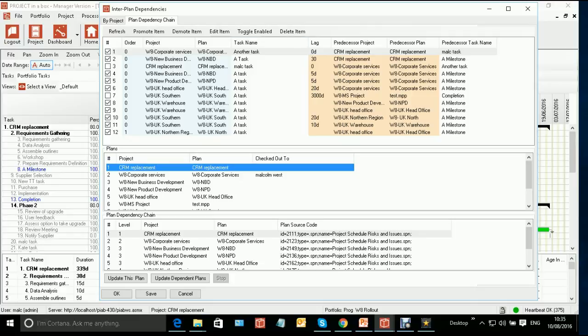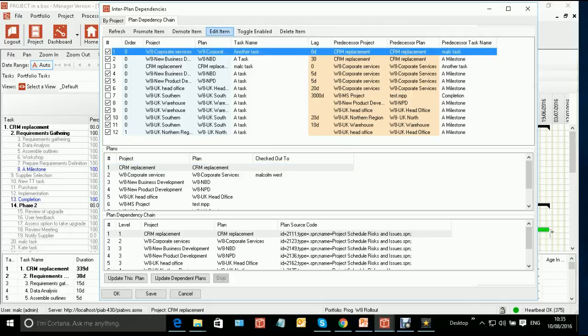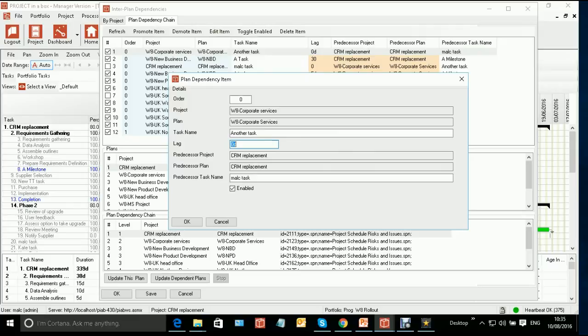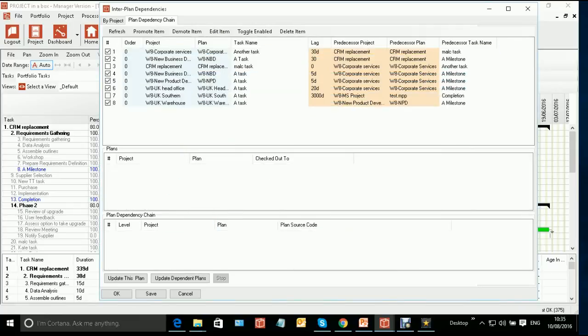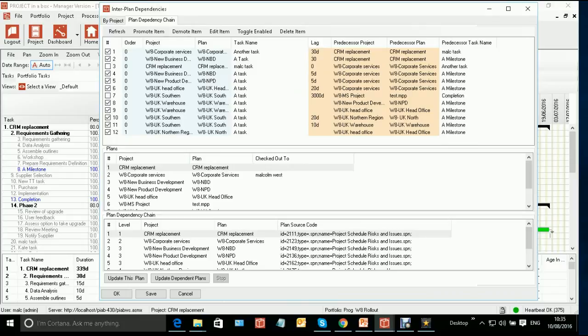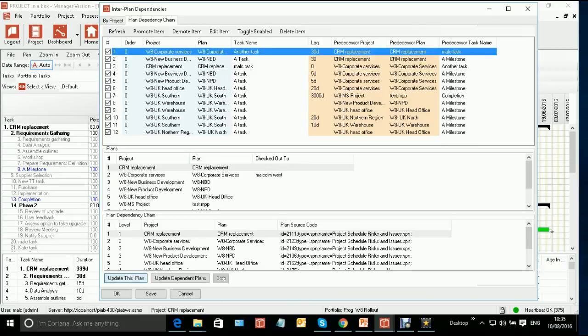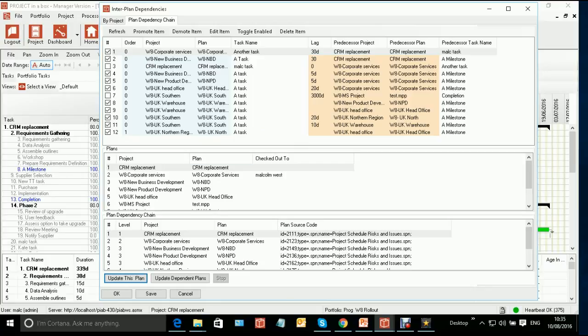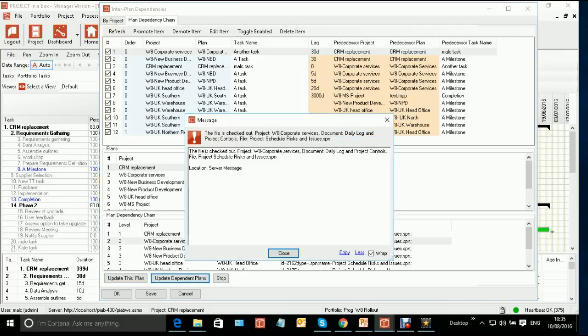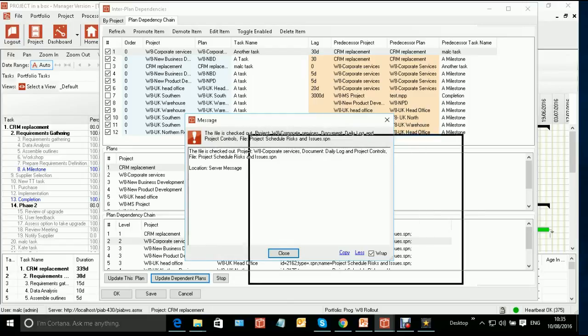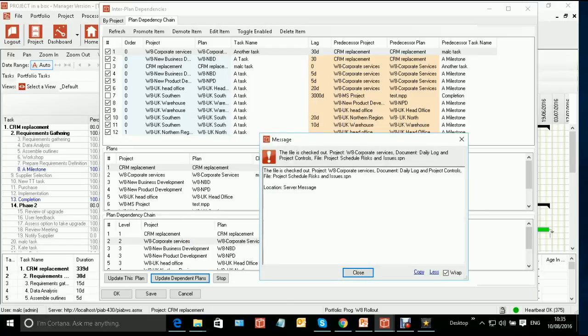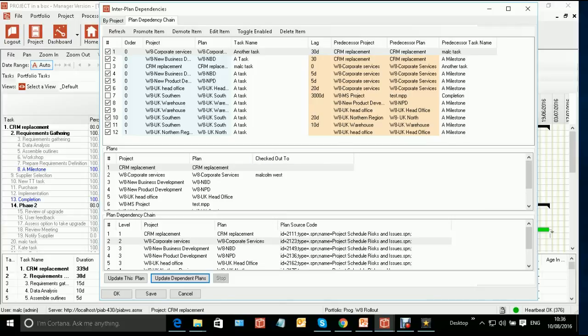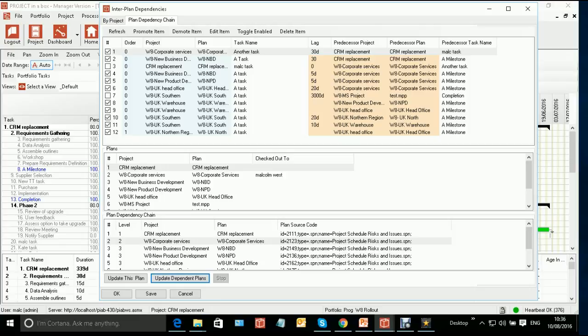So if I were to edit this item, edit this rule and say, let's put a 30-day lag into there and I now want to update that. Now, if I just update this plan, it will check out, make the changes, check it back in again. But what I really want to do is update the chain of plans. So here we are, update dependent plans. So it's going to take this one and work through the chain and we're going to see straight away the message that we get. When it gets to this next one, it says, actually, we can't work on that because it's currently checked out.